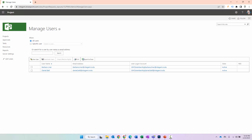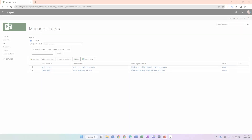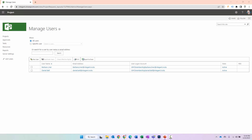There's also a way within Project permission mode where you can specify Active Directory sync. Active Directory sync in Project permission mode is really a two-step process. First, there's the enterprise resource pool synchronization, which adds resources to the enterprise resource pool so they may be added to project teams and assigned to tasks. That's why this is a two-step process — once you run the resource pool sync, you follow it up with the group sync. Therefore, if those resources added to the pool need to be moved to the correct groups, the group synchronization will take care of that.